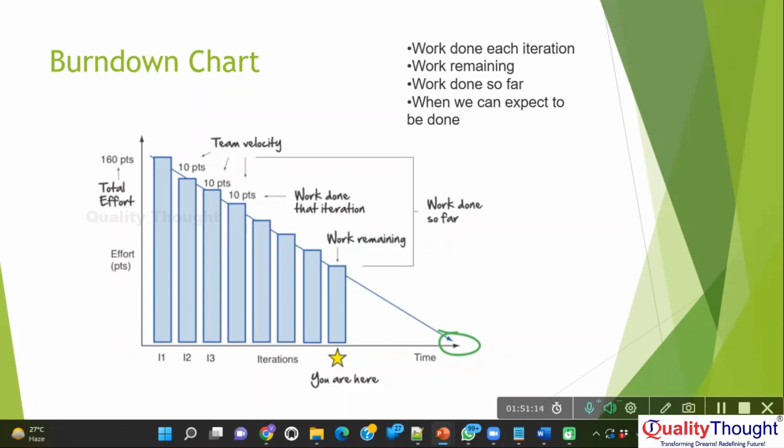I told you the duration of a sprint is 2 to 4 weeks. During the sprint planning meeting, they are going to provide estimates. Estimates are provided in terms of story points, not in hours. One story point is generally 6 hours.